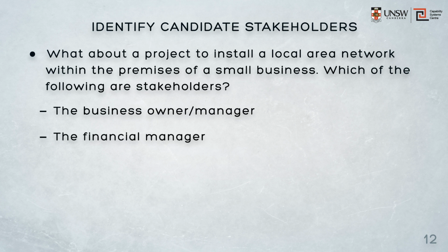The financial manager will no doubt have requirements with regard to expenditure spread, financial guidelines and milestones. Whilst these constraints must be taken into account, that doesn't make the financial manager automatically a stakeholder. Similarly, the operations manager will impose constraints regarding timing of work, disruption to existing business and cutover dates, but they're not automatically a stakeholder.